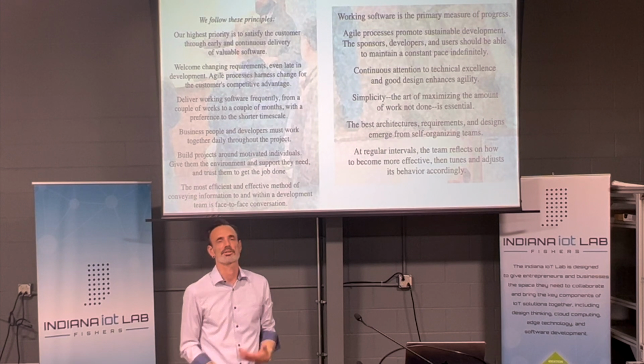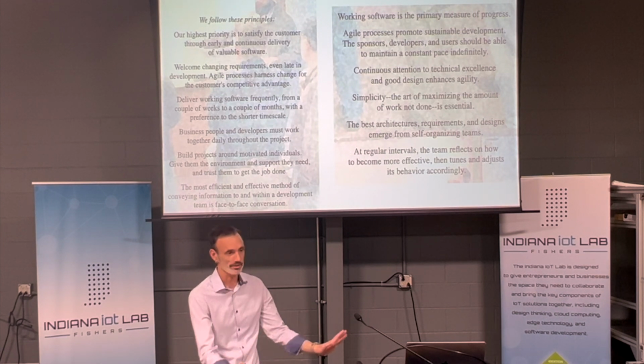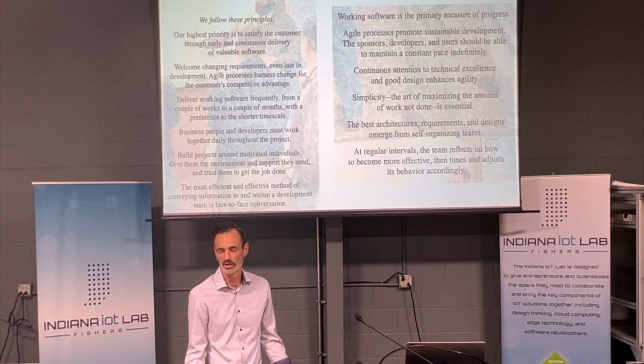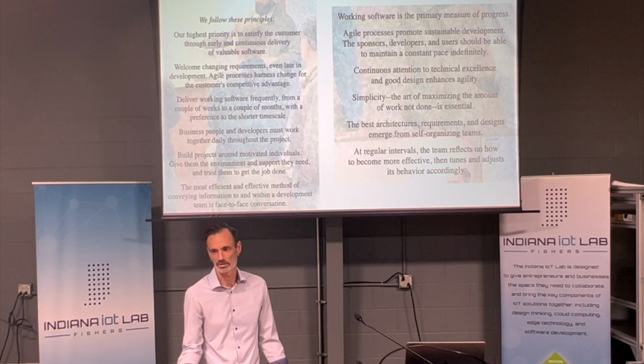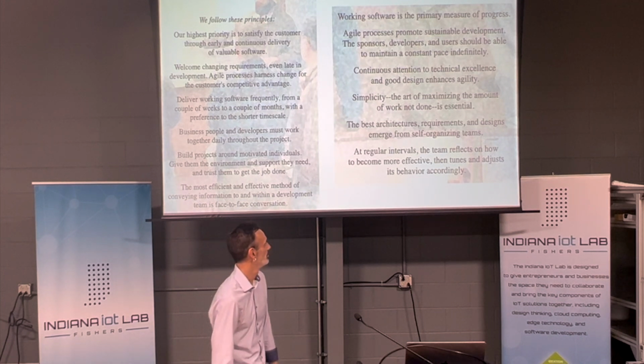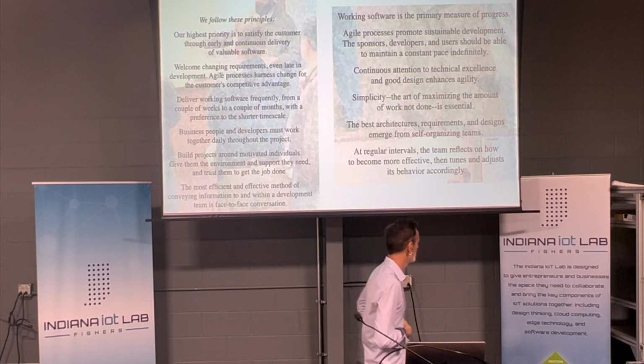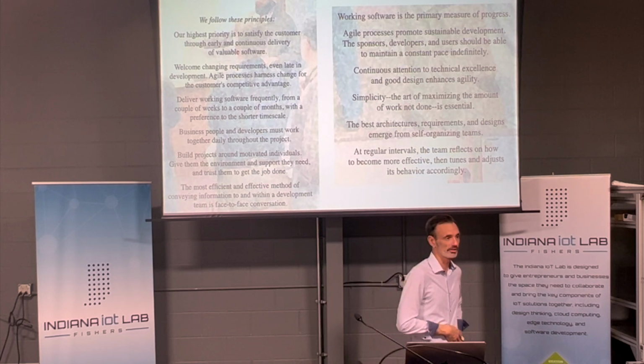The team just kind of stops. Let's go out to lunch. What happened? What went well? What went poorly? What can we change? What can't we change? What's out of our control? It's called retrospectives in Scrum and other Agile processes. I find it to be a very effective thing to do.